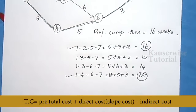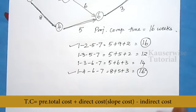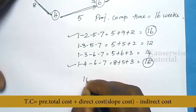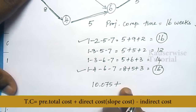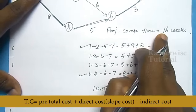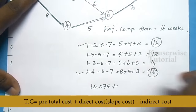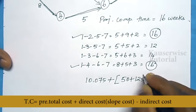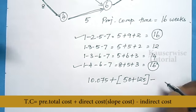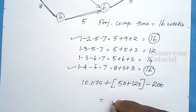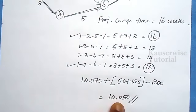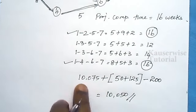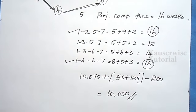Total cost for the third iteration: take the previous cost of 10,075, add direct expenses 50+125 = 175, and subtract indirect cost of 200. Total = 10,075 + 175 − 200 = 10,050 rupees. This is less than the previous iteration, so we continue to find the least total cost.